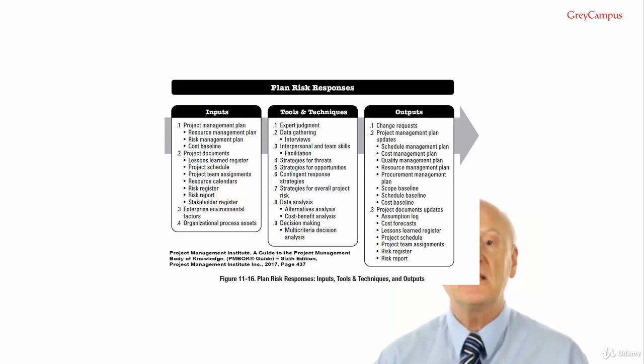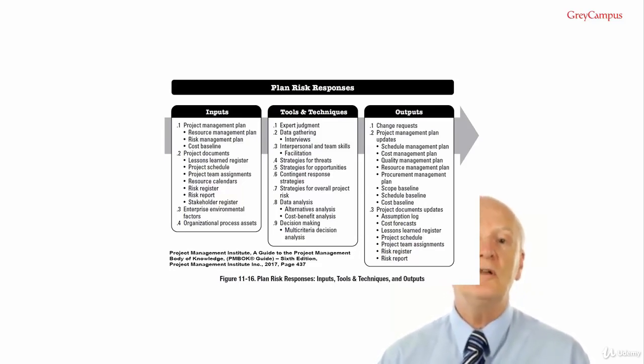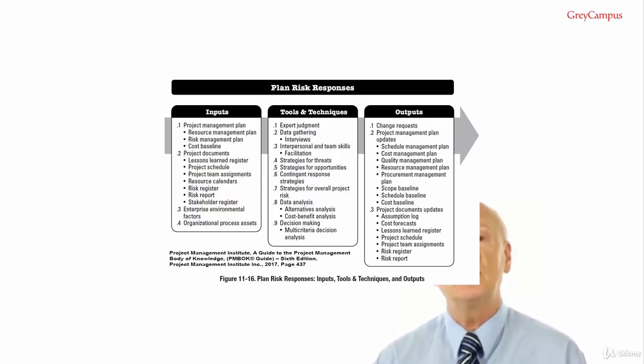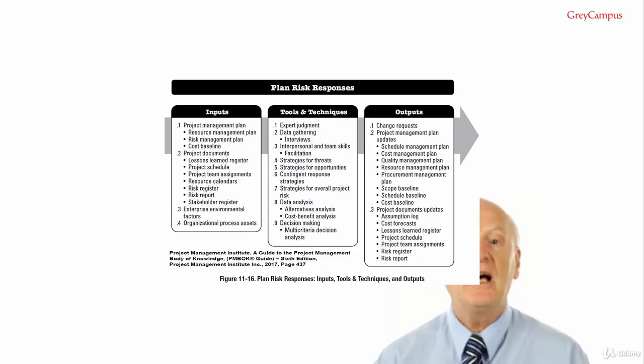If a threat is escalated, it is no longer monitored by the project team because it is effectively outside the project. Personally, I don't agree with this, and whenever I have escalated risks in the past, I have continued to have them monitored, but the PMBOK Guide says they aren't monitored, and that's what the examination question will expect you to say as well. Avoid.